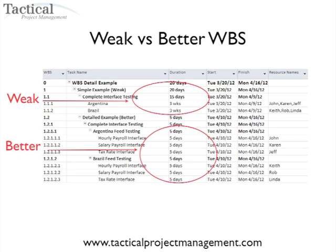A better way is to break down that test. In the second example, the Argentina feed testing is broken into an hourly payroll interface, a salary payroll interface, and a tax rate interface — with John, Karen, and Jeff each spending five days on each of those individual tasks. This way I'm holding accountability and breaking it down so one task is assigned to one resource, which becomes particularly useful when you do resource leveling. The same applies to the Brazil feed testing: hourly payroll interface, salary payroll interface, and tax rate interface, with Keith, Rob, and Linda each assigned individually.